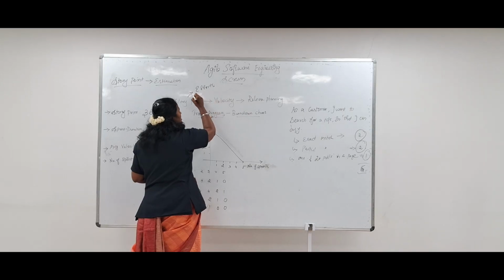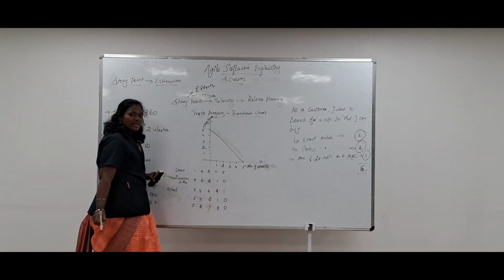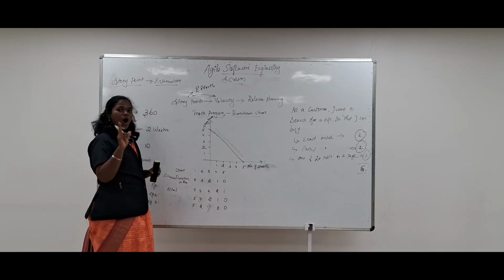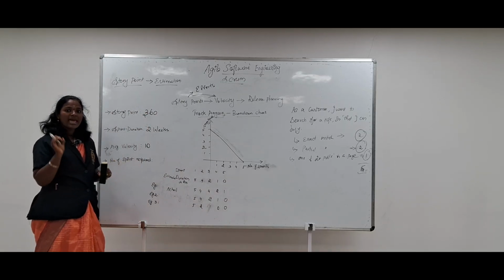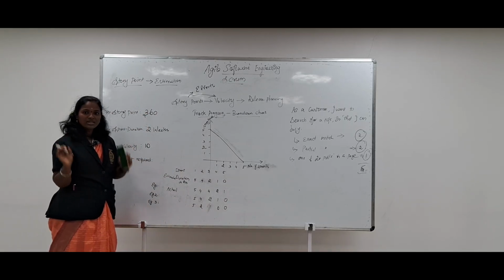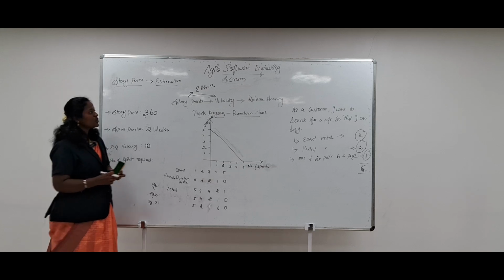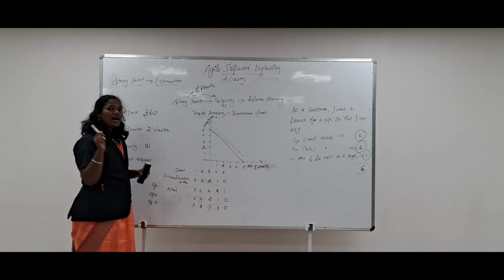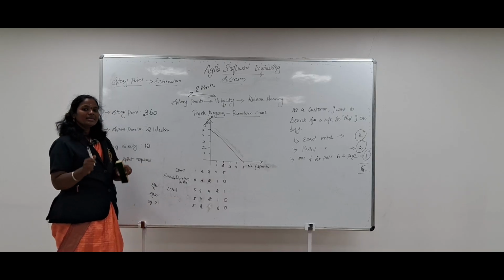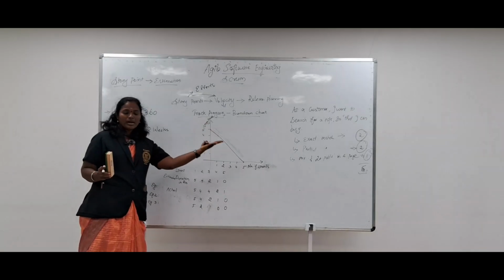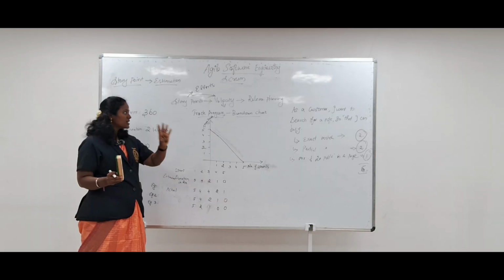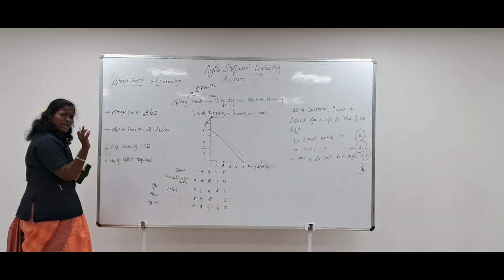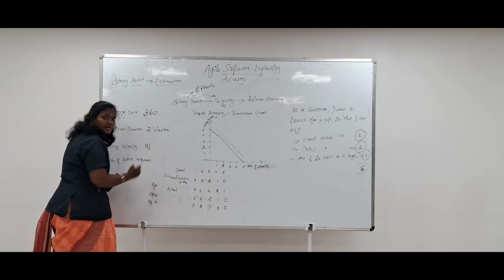So for this we need the velocity. The velocity is nothing but how many story points can be completed by the Scrum team in a sprint. This velocity is based on prior data which is available, the historical data which we have to take for the team members. Based on that we have to calculate the velocity.